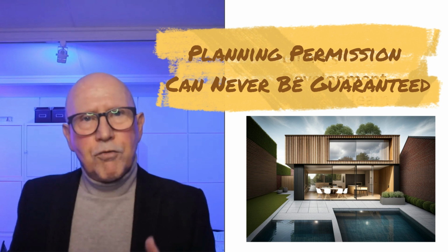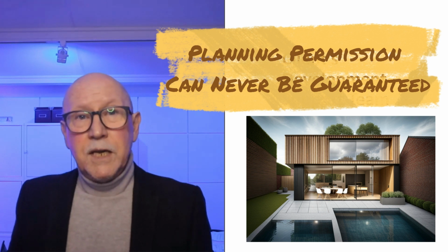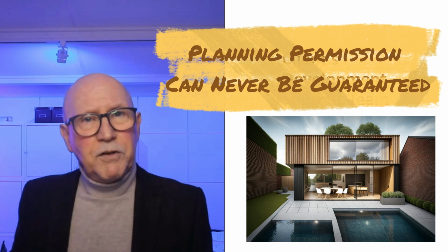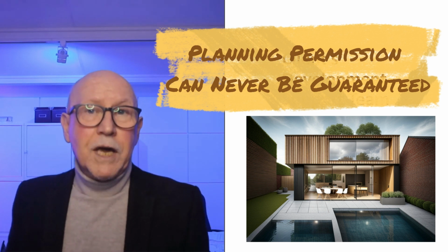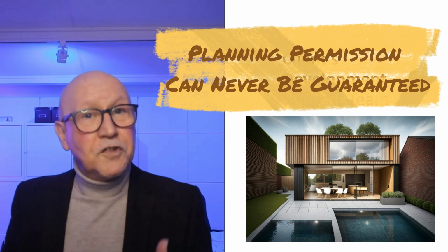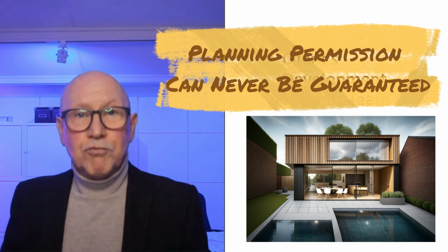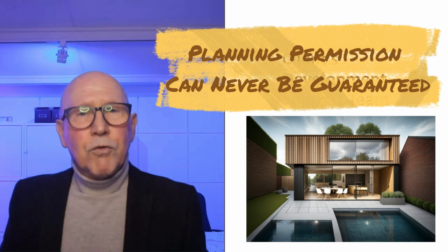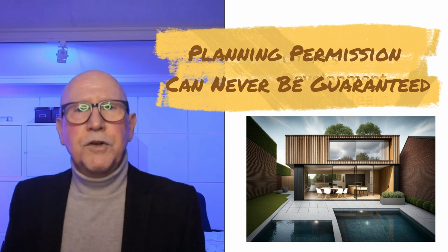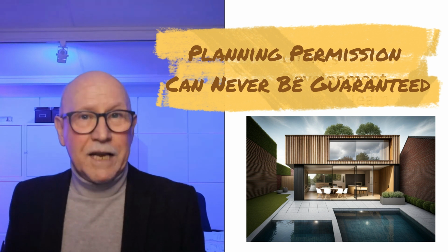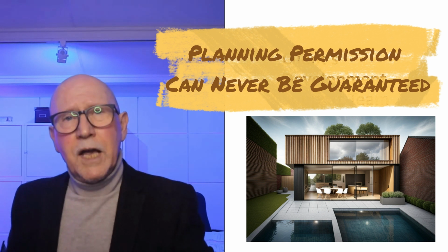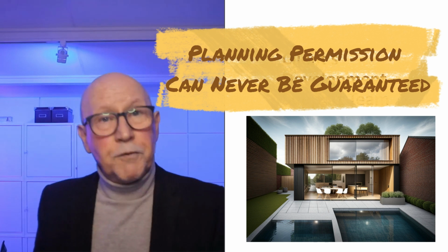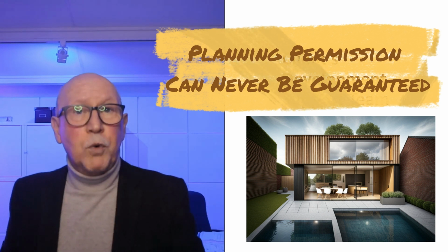So I hope by now you have noticed that I do not refer to obtaining planning permission. And the reason is very simple. It is because you are not in a position to offer your client a guarantee, since the UK planning system is discretionary and not regulatory. I will refer to this specific topic in a later video as part of this series, because it is important to be able to distinguish and differentiate between the two and indeed what they mean.